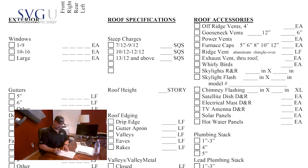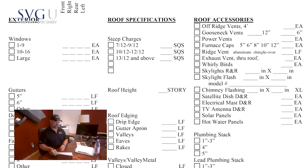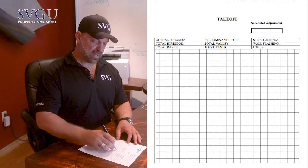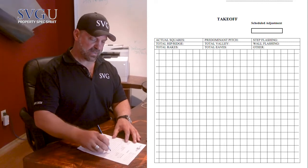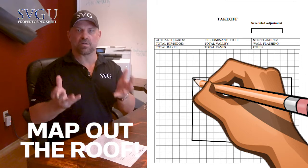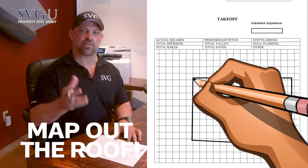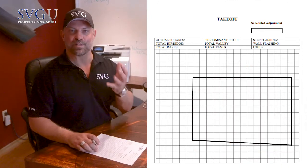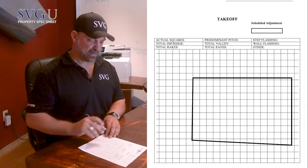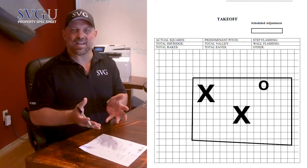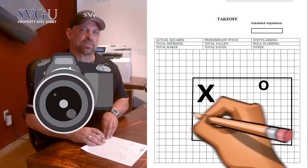We're quickly writing down our roof specs. Do we have a TV antenna? Do we have solar panels up there? We're just doing a scope so we can write that estimate properly back at the office. It's also helpful — if you notice something weird on a property, use that quick takeoff sheet. If the house needs an emergency repair or a tarp, write a quick note on the area where that leak's coming in so the folks back at the office can send the order out to the roofer to tarp the right area. Same with any special vents, skylights, or anything odd — always take a picture and jot some notes on your takeoff sheet.